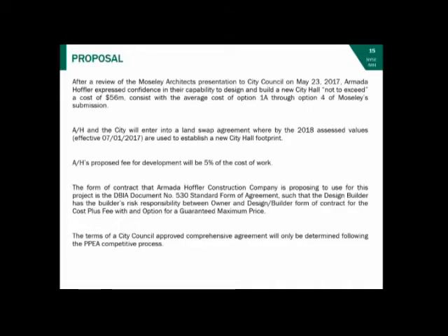for them. Their proposal is that Armada Hoffler will use a Design Build Institute of America document standard form agreement such that the builder's risk is a cost plus fee, meaning that the PPA accepted price through a negotiated comprehensive agreement is a guaranteed maximum price contract.